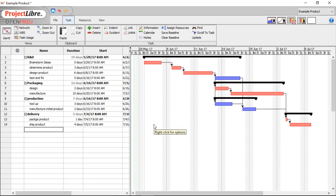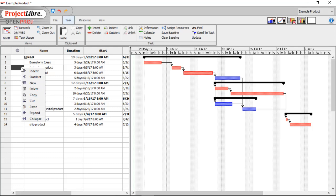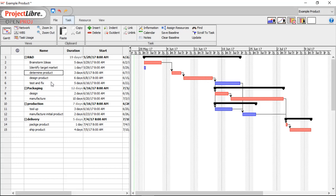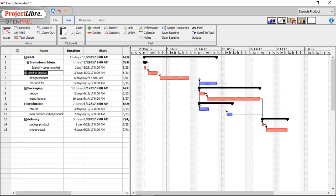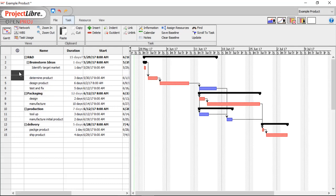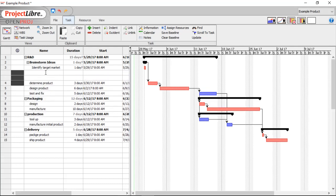This is where Helen's video ended off, but we added a few extra items in here. So the first things we're going to add, we're going to add some tasks underneath of brainstorm ideas. So to add a task, right-click in the row below where you want it, click New. And that gives you a free line to add what you want. So part of brainstorming is going to be identify the target market. And we're going to indent that underneath of brainstorm. Let's add two more lines. So we'll right-click New twice.